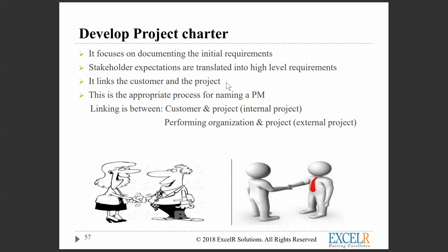Basically, this is a job. Again, I'm reiterating, the project manager will not prepare the project charter. It is the business who prepares the project charter. The project manager is a liaison to work with the stakeholders. It is not his KRA. It is the responsibility of the project owner, the sponsor, who prepares the project charter. The project manager is responsible for getting the project charter done, but he is not accountable for it. So there's a difference. Like a bridge, yes, he's a bridge.